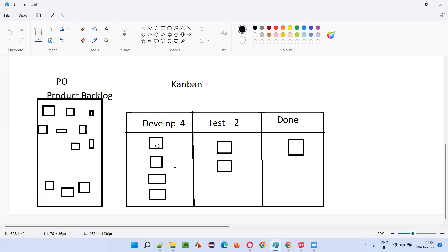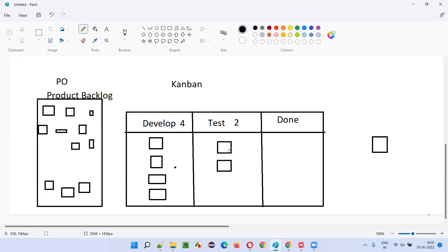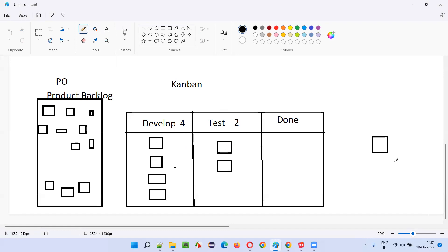They'll move one item from the product backlog to the development team. This is a continuous process. Once an item is done, it moves to the right side. All requirements continuously move to the right side. If anything is blocked, there is a concept of using dots — they put dots on that story so everyone focuses on it and tries to move it to the right side. If any blockages happen, the entire team — product owner, business, development, testing — all look into that particular item which is not moving and help move it.